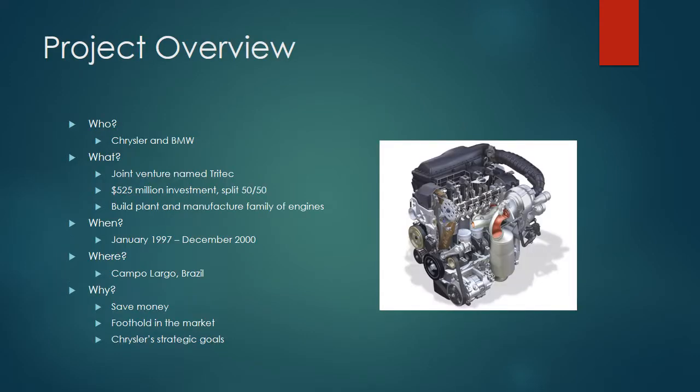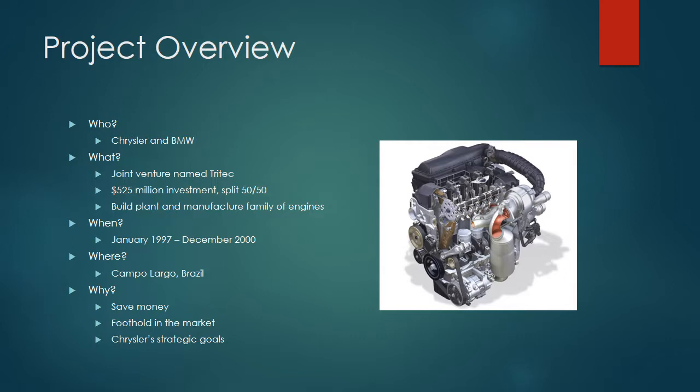The particulars of the project: the key players involved are Chrysler and BMW, and they entered into this joint venture in January 1997. The joint venture was named Tritec, and it was a $525 million total investment, split 50-50 between the two parties. That aspect is key, which we'll get into later.